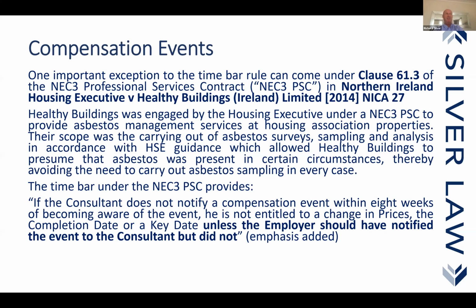So you should be saying in an extension of time notice, dear sir, we hereby advise you that we're being delayed by reason of the late issue of information, this being a relevant event. In accordance with our construction programme, activity 1, piling, was due to start on the 1st of January. 2 weeks before, we asked for relevant information as per our request for information sheet number 13, where we set down in full detail the information that we required. Unfortunately, this information was not forthcoming, and as a consequence, this has caused a delay.